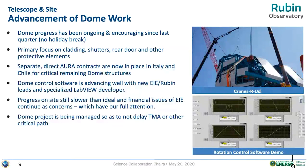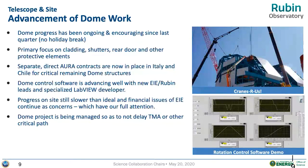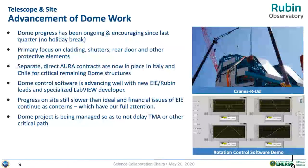The project has done an extraordinary job navigating some of the difficulties. For example, some of the subcontracts of the dome contractor have been taken over directly by the construction project to relieve the prime contractor of that burden. It's still slower than we want, and there are still some financial issues with the main contractor.